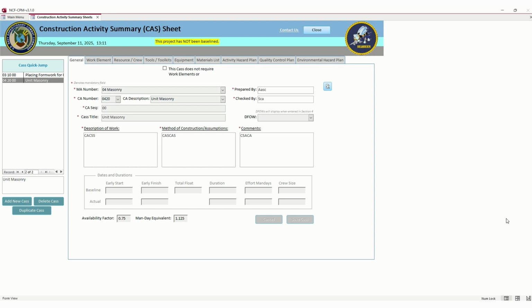What a duration or milestone will help you with is this: is it a contractor or not a contractor? If it's work we're doing, then we don't have to necessarily use it as a duration. This will mostly be for HVAC, fire suppression, anything else that's out of our control. You can put that it's going to be done by others. You would write down here, being done by contractor. And then you could put the number of days it's going to take for that contractor to complete the task. Whether it's 45, 60 days, 2 weeks, 1 week.